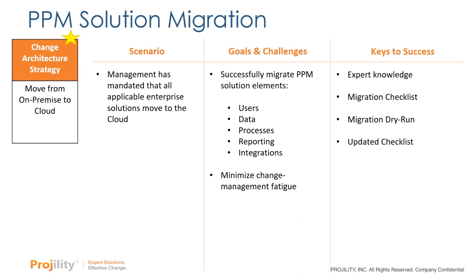But you're going to perform this migration dry run using this checklist, and you're going to step through, like I described, every aspect of that checklist. And you're going to do this in this test environment, so that you can gain an understanding of the accuracy of your migration steps. Did you forget anything? Was any step left out? Were there any gotchas that were previously unforeseen? Were there any corrective actions that you needed to take? Also, a big one is the timing. How long did this take?